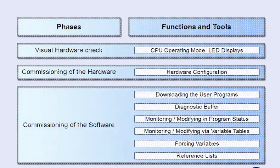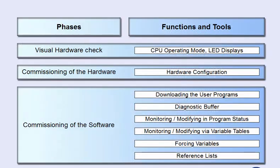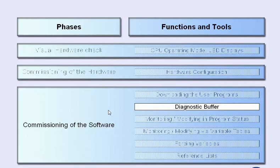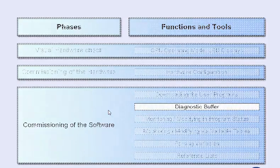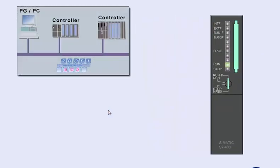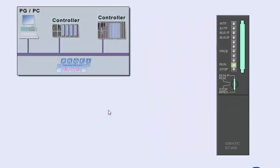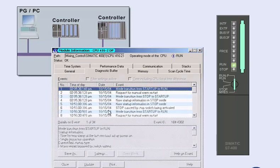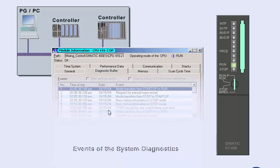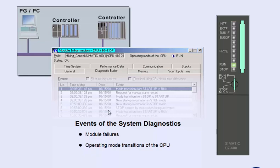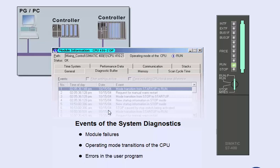The diagnostic buffer provides one of the most important aids to system diagnostics. It can be used for reliably diagnosing and localizing errors in the program, and also the hardware during the commissioning phase, as well as later plant operation. The diagnostic buffer is located in the system memory of the CPU, and can be read any time with the SIMATIC Manager. In the diagnostic buffer, which is designed as a ring buffer, all important events are saved, for instance, module failures, operating mode transitions of the CPU, or, for example, errors in the user program leading to stop mode.